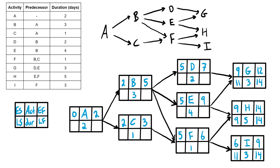Where there's only one successor, we bring that late start number straight across as the predecessor's late finish. So we bring eleven into activity D's late finish and subtract the duration of two, giving a late start of nine for D. For activity E, which has two successors, we take the smaller of the competing values — eleven or nine — and bring in nine. Nine minus four gives a late start of five for E. For activity F, which also has two successors, we take the smaller: nine or eleven — we bring nine. Nine minus one gives a late start of eight for F.